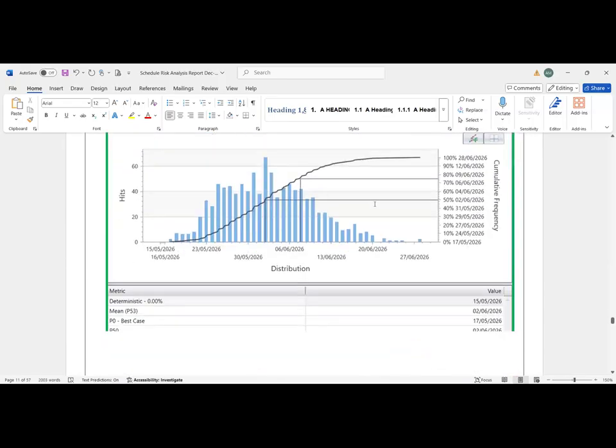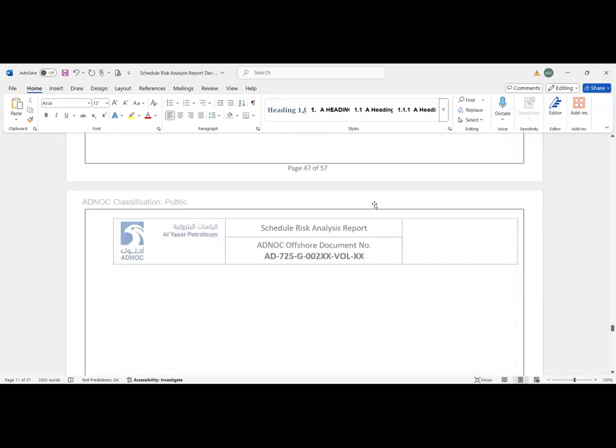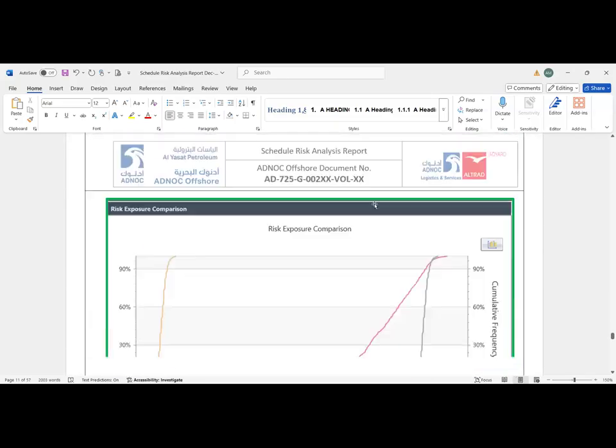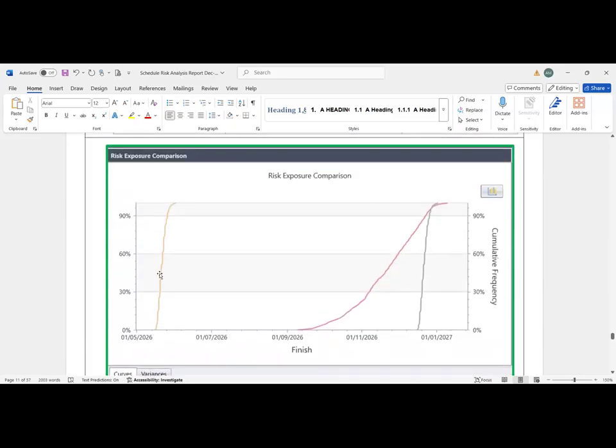And there will be a third curve here. This curve will show that when we mitigated, the duration of our project decreases again. So without risk assigning, only duration risk, is the red line. With assigning risk is the green line, and when we mitigated the risks is the yellow line. So this is the probability of project completion.